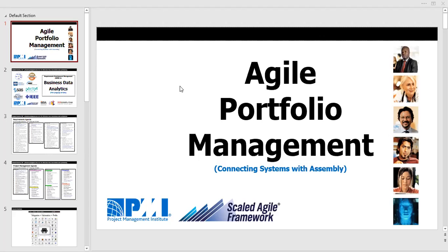In particular, the session about Agile and waterfall assembly, as well as the session that we did last week regarding project estimating, where we talked about really 3 phases of estimating and what I would call six steps of the process of moving from expert judgment through planning poker and story points to bottom-up estimating or historical analogous estimating, which is really where you're just cloning records from a previous project, to parametric estimating, and then ultimately to Monte Carlo analysis, which is regression or prediction.